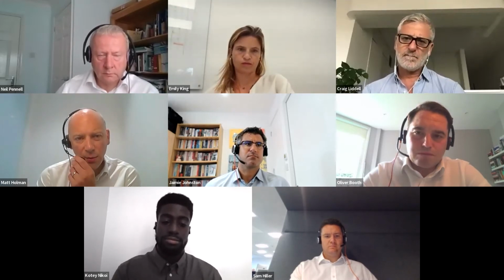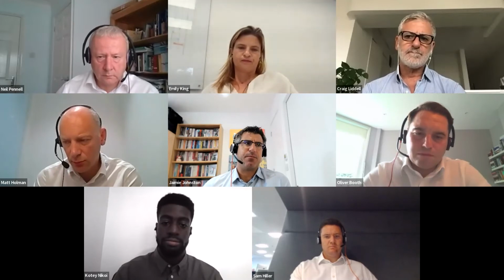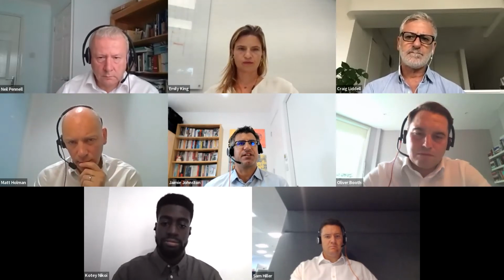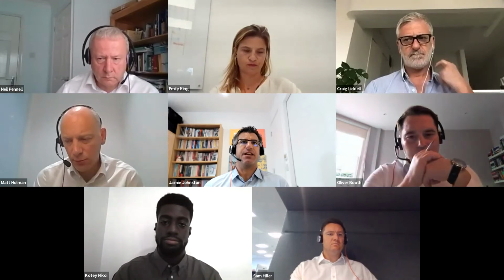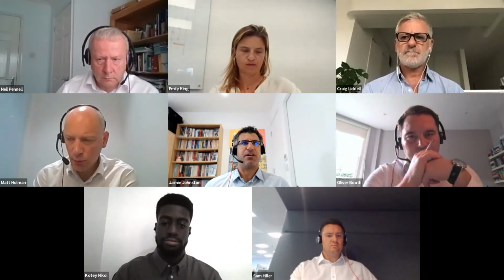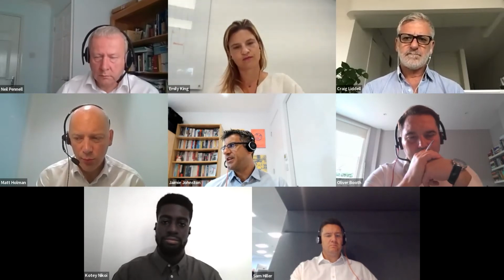Great, thank you. Jamie, anything to add on that? Yeah, I think Koti's right, it's the design process. So we like the term design for manufacturing assembly as opposed to MMC because it describes the process. A traditional design process, certainly on the RIBA stages, is very sequential and linear. Concept design gets handed over to another party who does the documentation, who hands over to another party who does the detailed design. So there's a lot of handovers, and the disciplines tend to work in sequence.